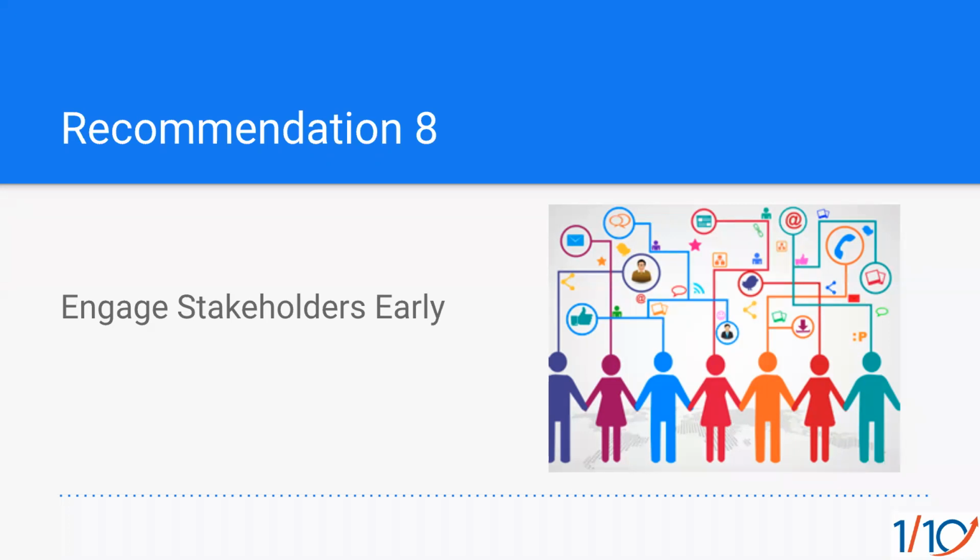Constantly throughout the process, have visibility to what's being done. On larger implementations, I like to have stakeholders involved in all our development reviews. So there's familiarity with the system. Their expectations are aligned so that when we go live, there's no surprises. So the more you can engage stakeholders early throughout the process, I'd say at the very beginning, the better.